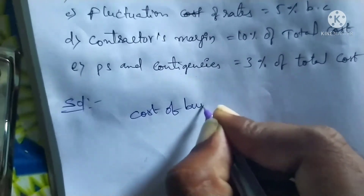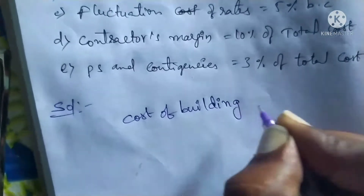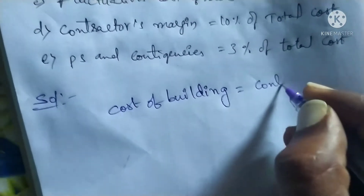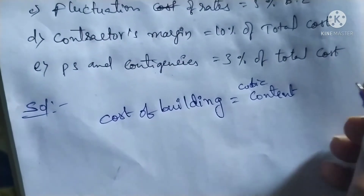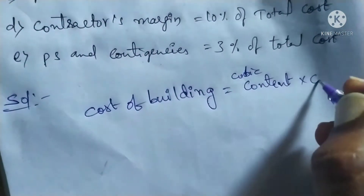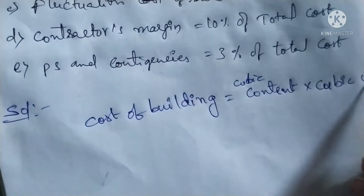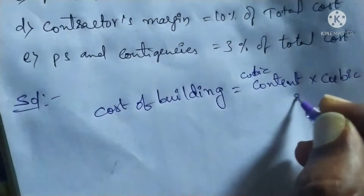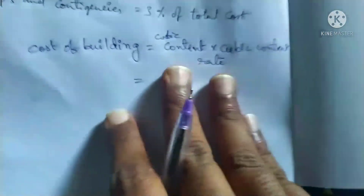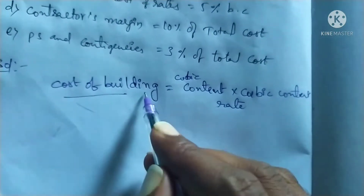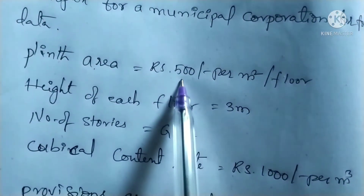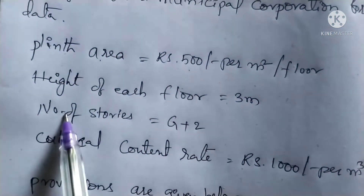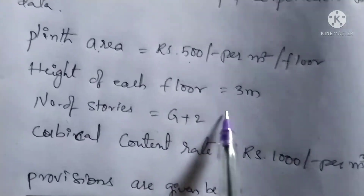The cubic content is calculated from the plinth area. Cubic content equals plinth area into height of each floor into number of floors. Plinth area is 400, height of each floor is 3 meters, and G plus 2 means 3 floors total.